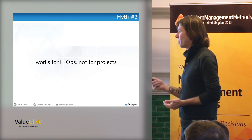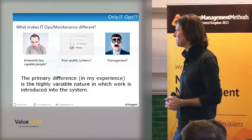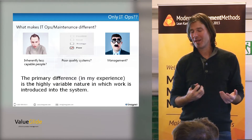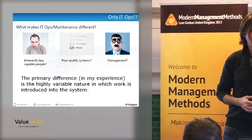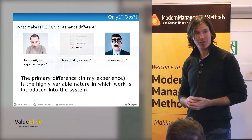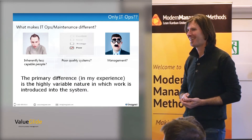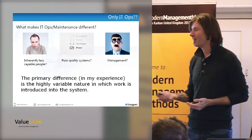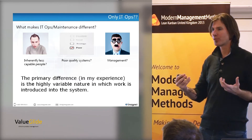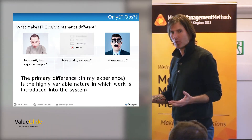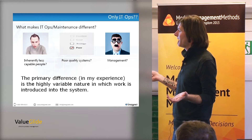Myth number three is that Kanban works for IT ops and not for projects. What makes ops and projects different? In my experience, the primary difference between ops work and project work is just the highly variable nature in which ops work will be discovered. We don't actually plan for outages or bugs that need to be fixed right now. That's really the only difference I've seen. So when we say that Kanban can't work for projects, it's kind of wrong.